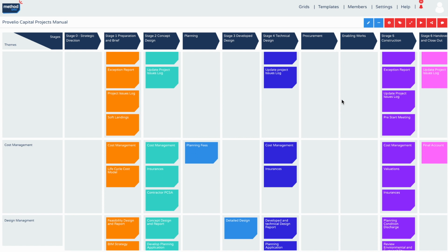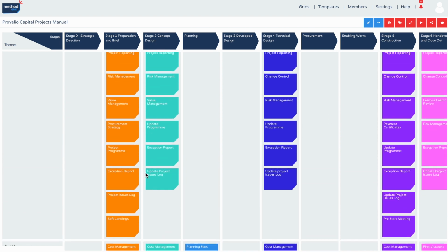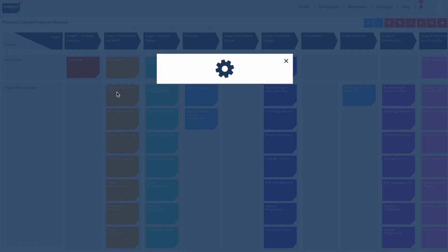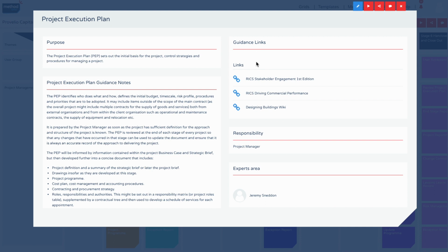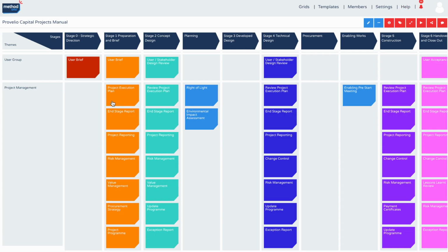And just so people can visualise it very quickly, what we anticipate doing is that architects who are building out elements will be able to add a new content area to their element, which we're going to call a task checklist, and you can add multiple tasks to an element. It might just be a simple single one, element completed. It could have multiple subtasks. And then at the grid view, if you imagine you'd added five subtasks to this element, you'll see a progress line for actual completion, and even the ability to toggle the colour of the element to denote 100% of all tasks complete, just to give that, as you say, summary view.